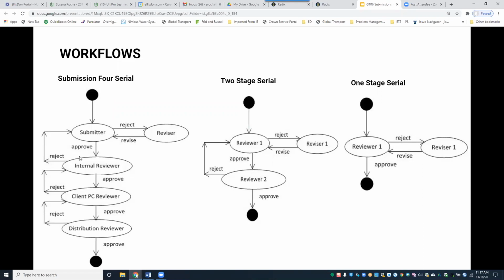And then right here, someone goes in to Gate 3 on the submitter's behalf and uploads what the sub has submitted. Could be as-built, a shop drawing, and then you push it to an Elliston internal review, and you can reject or approve. The Elliston stamp gets uploaded at this stage, and then it gets pushed out with the transmittal to the primary reviewer, the primary consultant.